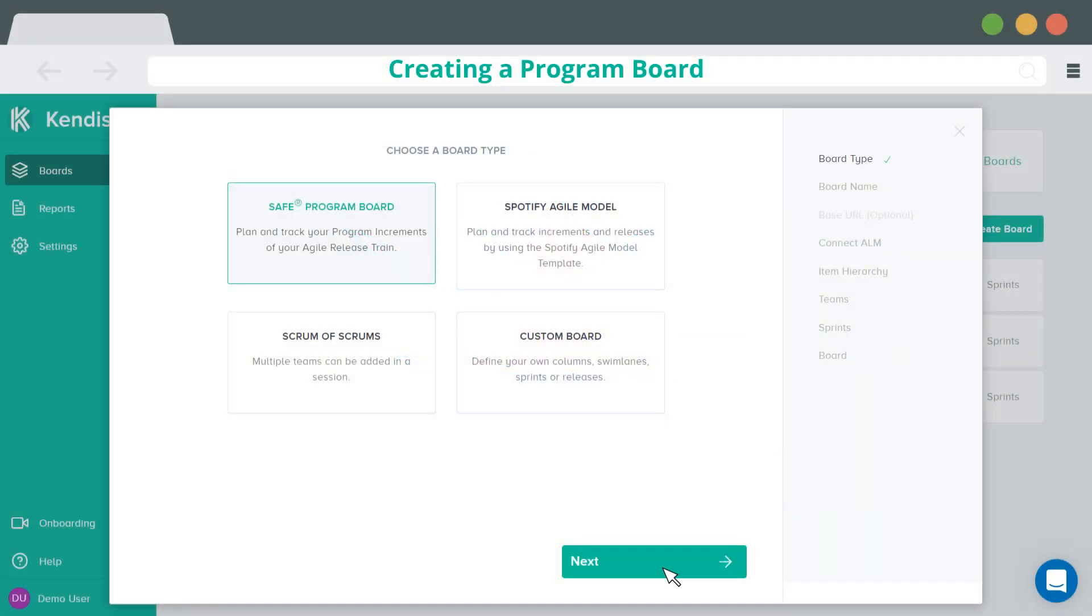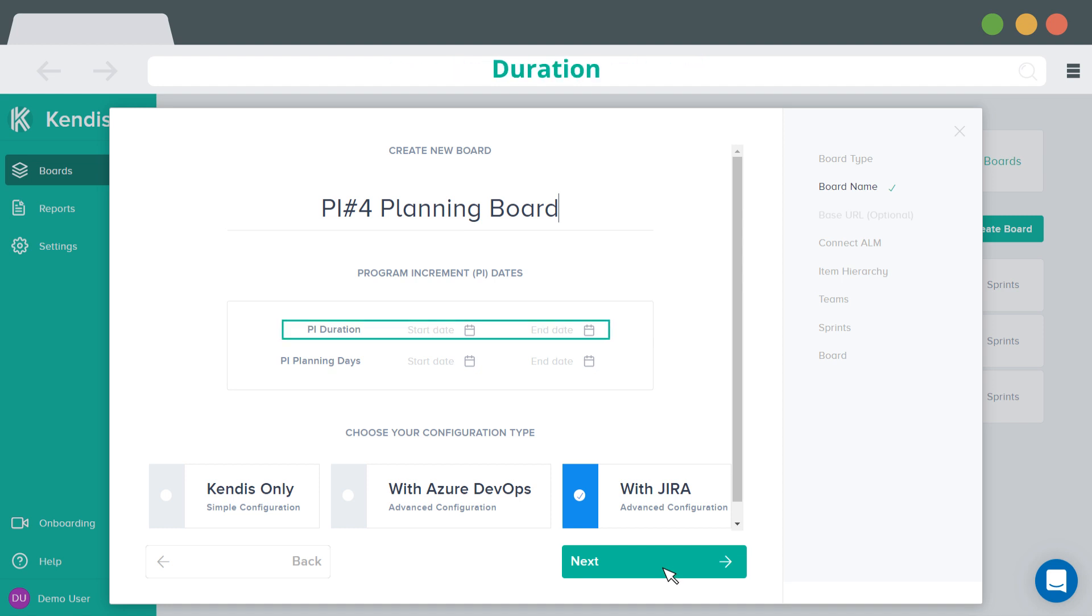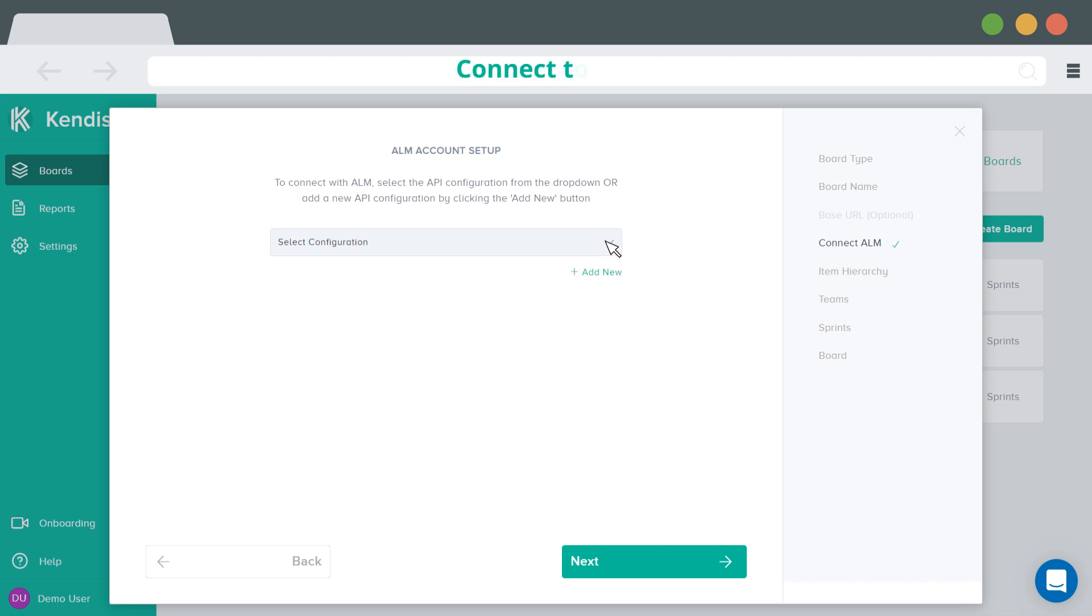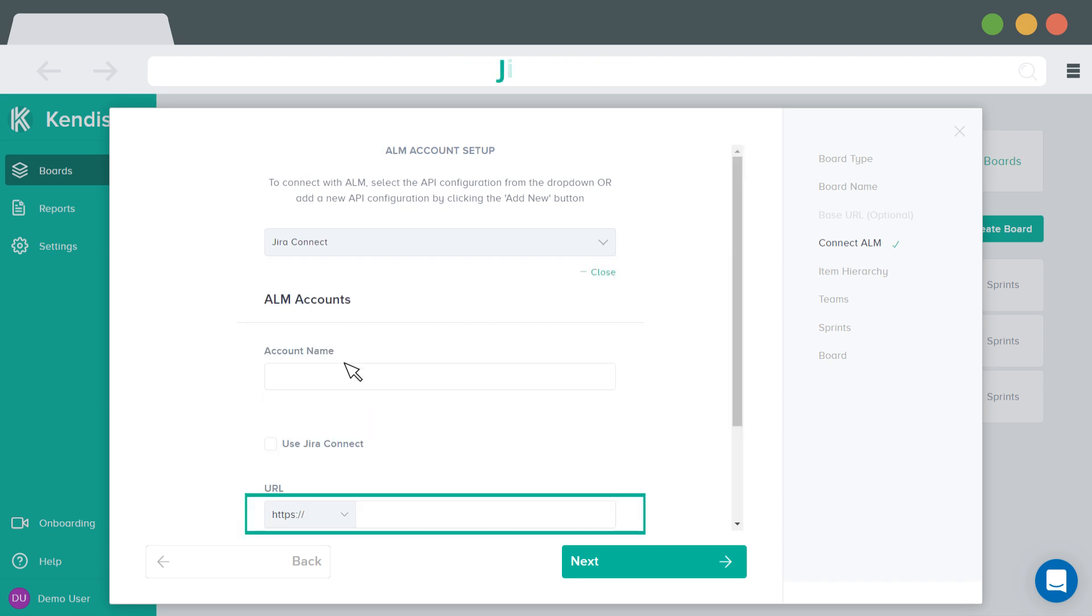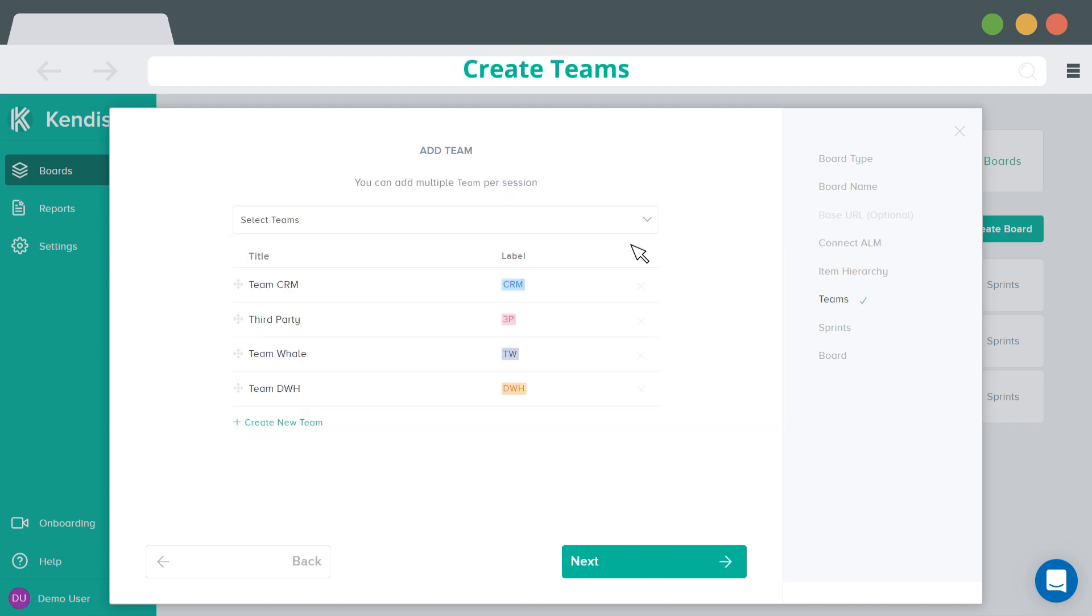Before the PI planning, Release Train Engineer can set up a board, define the PI dates and duration, connect to Jira by providing a Jira URL and credentials for Jira API, create teams by providing their names, labels and colors.